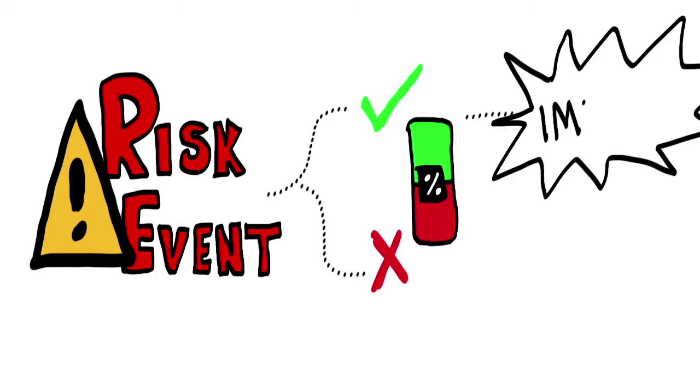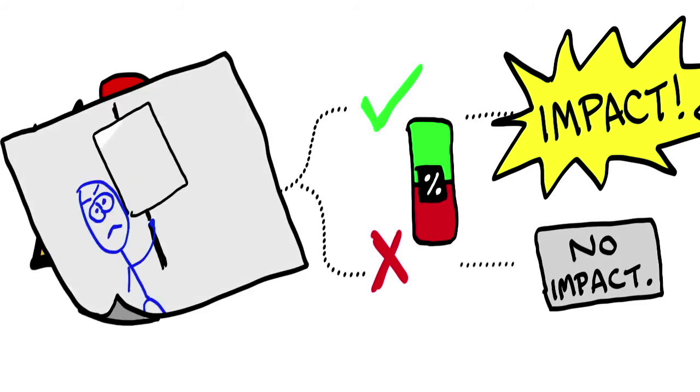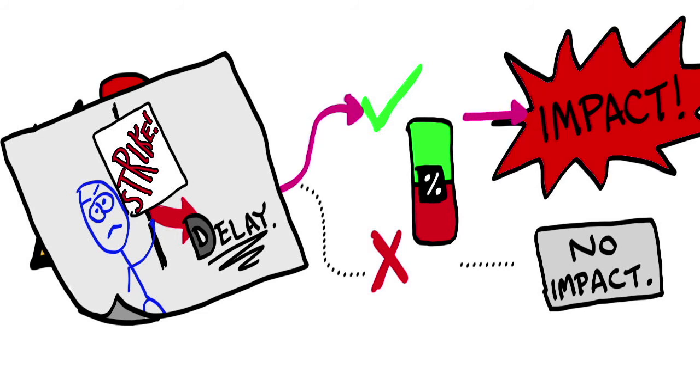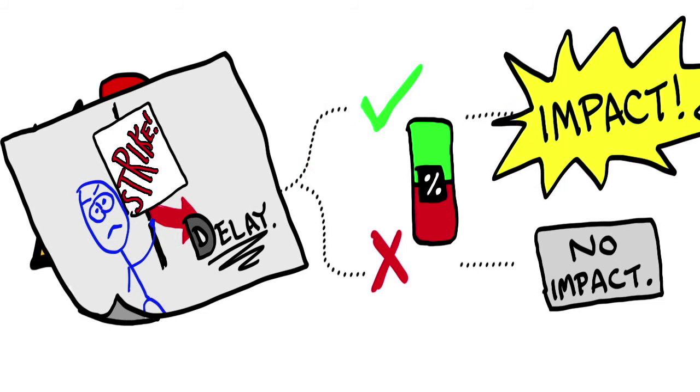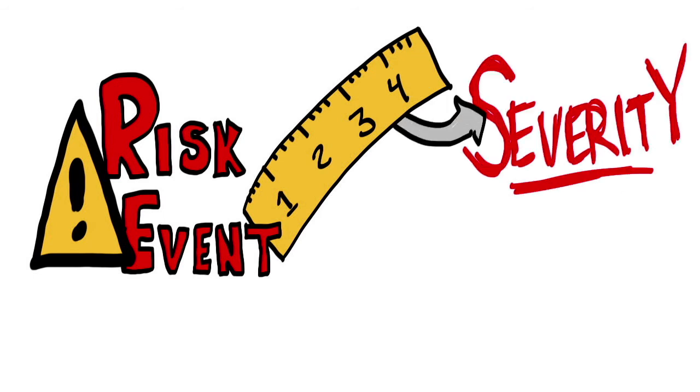If it does occur, it has an impact on the estimate, otherwise it has no impact. An example might be a labor strike that delays construction of a critical asset. It may happen, in which case there is a significant impact on the project. It may not, and thereby have no impact.